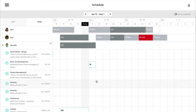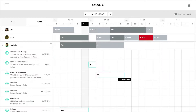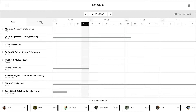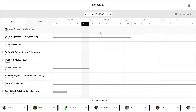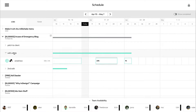In this case, she's going to do some back-end development. For the rest of the week, I might want her working on project management, so I can just drag across and up to make that assignment for her. I've allocated 22 hours, leaving a free time of 6 hours. Coming back to the Jobs tab — as opposed to the Team tab — you can see sorted by job all of your team members. Because my browser window is expanded enough to show 3 weeks, I can see the remainder of this week and we're calculating availability for each person based on the hours set up in their preferences, showing how many hours free they have to work on other things.